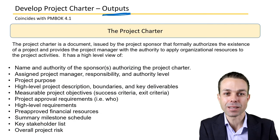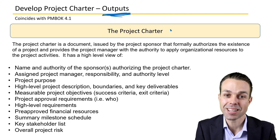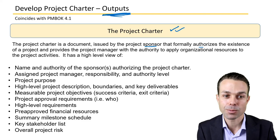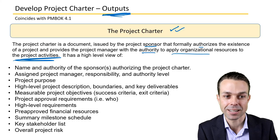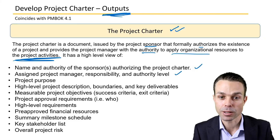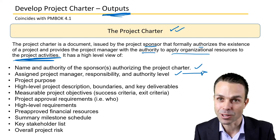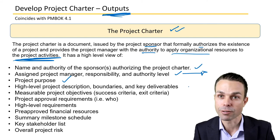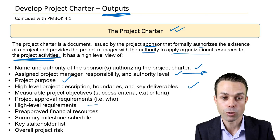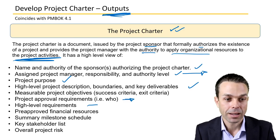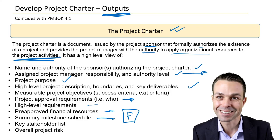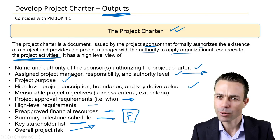Now let's look at the outputs of developing the project charter. The project charter itself is one of the outputs — it's the document issued by the project sponsor that formally authorizes the existence of the project and provides the project manager with authority to apply organizational resources. This document includes the name and authority of the sponsor, the assigned project manager and their authority level, the project purpose, high-level description, key deliverables, measurable project objectives, high-level requirements, approval requirements, pre-approved financial resources, summary of milestones, key stakeholders, and overall high-level project risk.